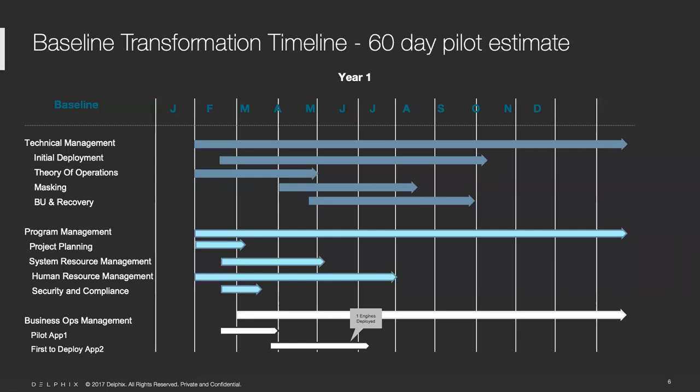Talking about the timeline — a 60-day pilot estimate, again doesn't have to be Delphix, could be anything. In the timeline you see a one-year deployment for the enterprise level. If you're constrained in one year, just shift the months around. Your initial deployment could cover all those baseline deployment blocks. The 60-day pilot is when that customer starts seeing return on their investment — when you get the first system in and the first virtual database. It's going to take some time: masking, backup and recovery — so you're going to have that initial deployment and theory of operations.